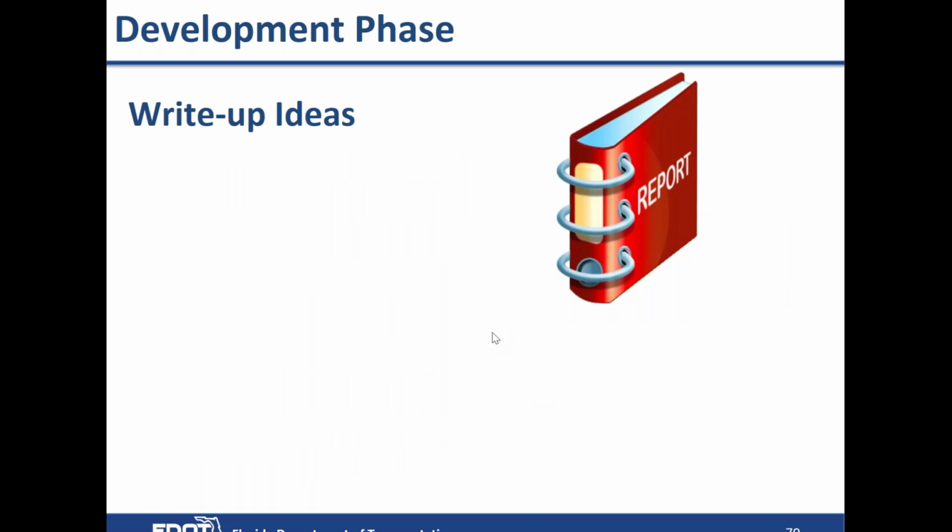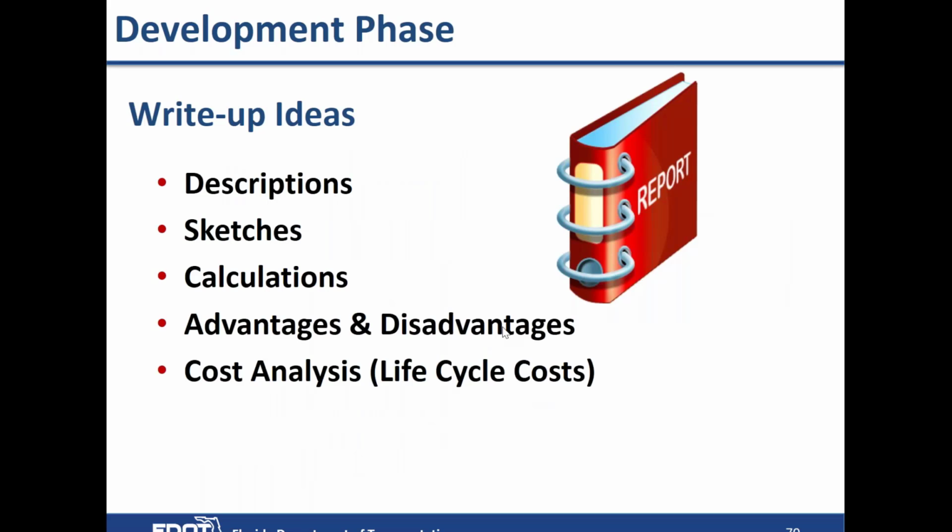So as far as development, the ideas need to be written up into recommendations, descriptions, sketches, calculations, any advantages and disadvantages, and any life cycle costs. And a life cycle cost is the cost of that idea from concept to the end of its life, cradle to grave.